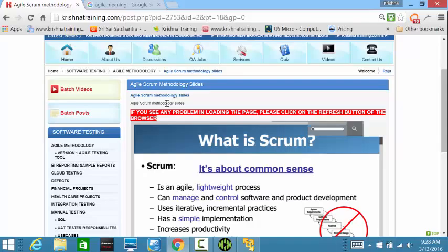Now, when waterfall methodology is following this model, it's kind of a religion. They want to follow that religion in a very orthodox manner. They don't want to deviate. So in a waterfall methodology, every stage should have an exit criteria, and to go to the next stage, there should be an entry criteria. Requirements should meet an exit criteria, and when we go into high-level design, we need to meet some kind of entry criteria. If we are not meeting those criteria, then we are not allowed to do any activities in that particular stage.